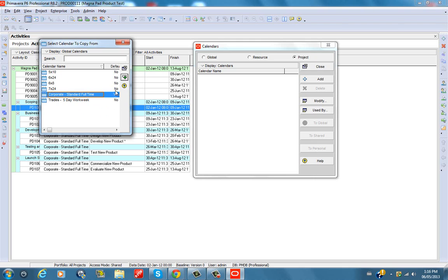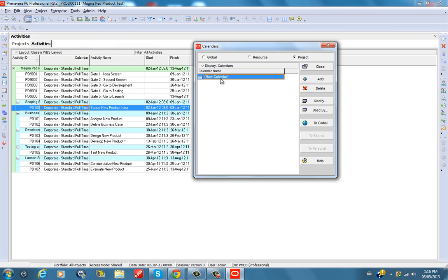Then I could just modify it by bringing it into the calendar box there, so I could use it for the project type of calendar. Then I could say select. So this has been selected. So in there now I could say sample calendar. You could say 8 hours in a week, or say 9 hours, 9 hours a day,